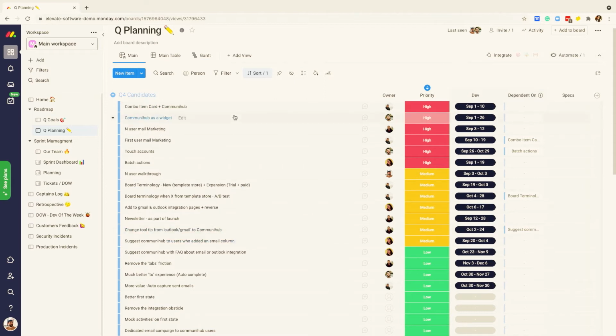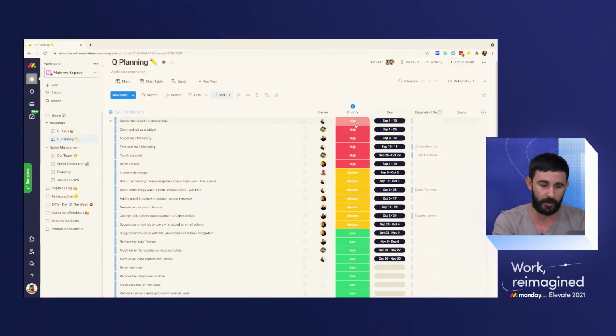So we have the name of the big task we want to achieve. We can also have an owner. So one of the engineers, as I mentioned before, has full ownership of a task end-to-end. So he's the owner. That also allows us to plan the queue much better. The priority, which is a proxy to the impact this will make according to our goals. And then we estimate very roughly how long will it take and when in the queue we will get there. And sometimes we even set dependencies. And we say, OK, maybe we can't finish this before that. For example, we need to design something before we build it. So we might have two separate items here, one for design, one for dev.